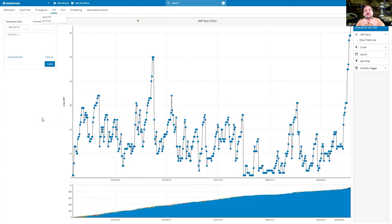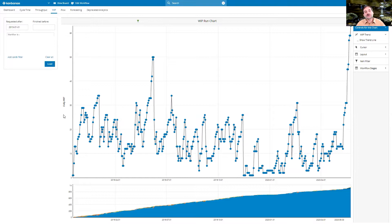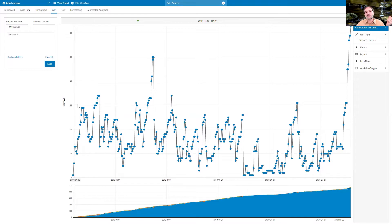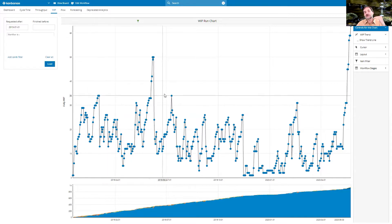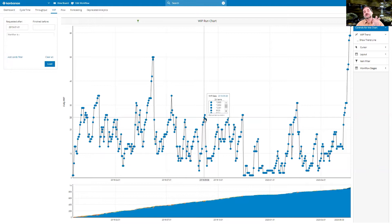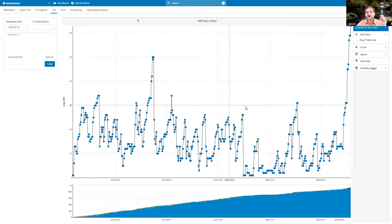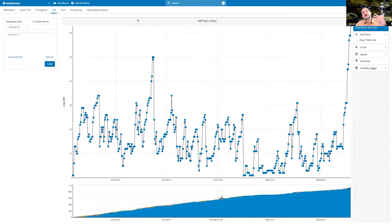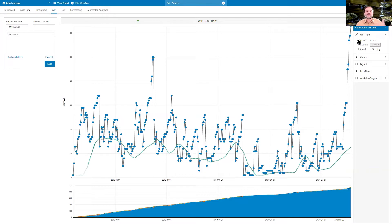Today we want to look at work in progress and I want to start with the run chart, which is very much the same as a throughput run chart. It has a date and the work in progress that was there at that specific date. This work in progress run chart actually shows us the little sliver of work in progress on top of a CFD, but mapped out as a scatter plot. So with this, we can clearly see trends.